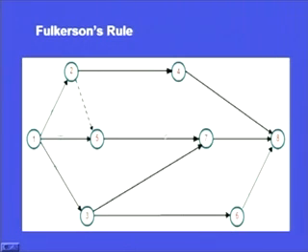So, we start from the node at which there are no arrows coming in and only arrows going out, we name it as number 1 and we strike off all the arrows going out and try to search for a node in which there is no arrow entering in and there are only arrows going out. That we number as a subsequent number.